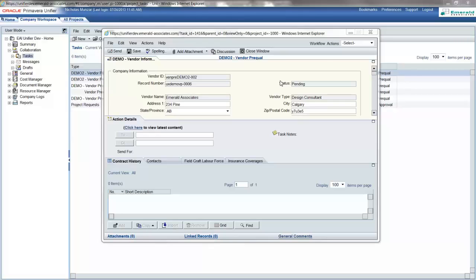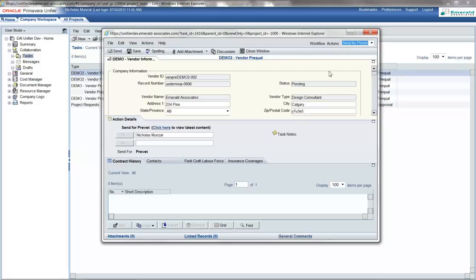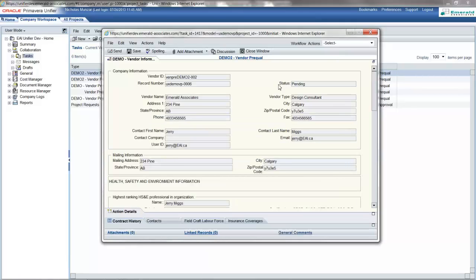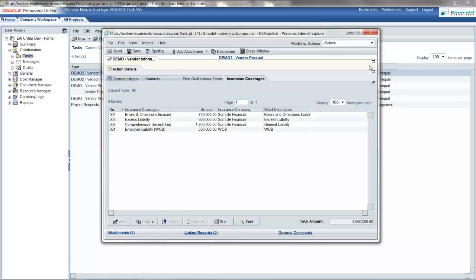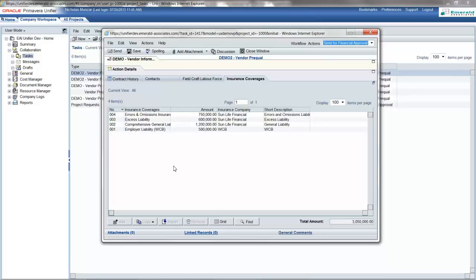From the vendor input form, once all the information has been entered, the form can be sent to the PreVet team for approval. The PreVet team will review the vendor information entered in the upper form and the line items. From here, the PreVet team will select a workflow action to send for financial approval. This will be the first step in the sequential approval process.